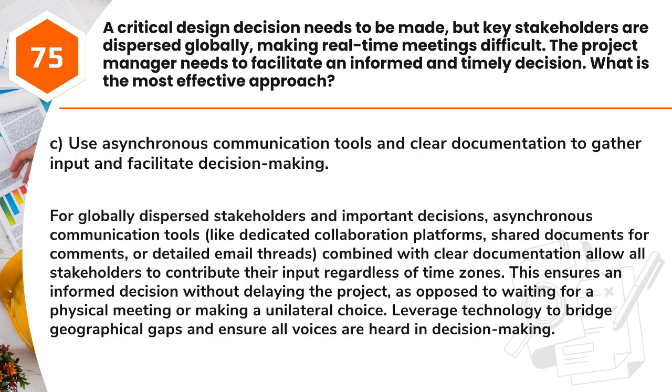Answer: C. Use asynchronous communication tools and clear documentation to gather input and facilitate decision-making. For globally dispersed stakeholders and important decisions, asynchronous communication tools, like dedicated collaboration platforms, shared documents for comments, or detailed email threads, combined with clear documentation allow all stakeholders to contribute their input regardless of time zones. This ensures an informed decision without delaying the project, as opposed to waiting for a physical meeting or making a unilateral choice. Leverage technology to bridge geographical gaps and ensure all voices are heard in decision-making.